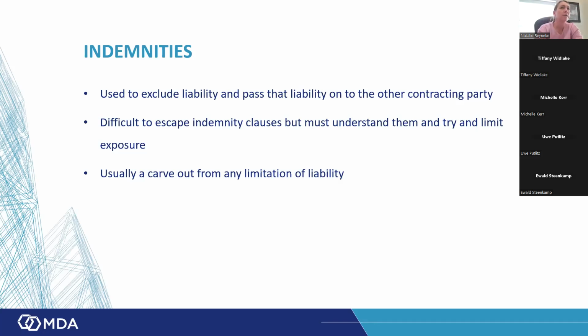Yeah, I think we do find that a lot of the employers try to say, I'm wiping my hands of the construction mafia and the contractor must take that risk. And I think that whether it's fair or not, nobody cares, to be honest, because what does the contract say? If there are any disputes or issues around the impact that the construction mafia have had on the contract, your answer is going to be in the contract. And if your client or a contractor has signed a contract where they've taken on that risk, it's going to be very difficult for them to say, but it's not fair.